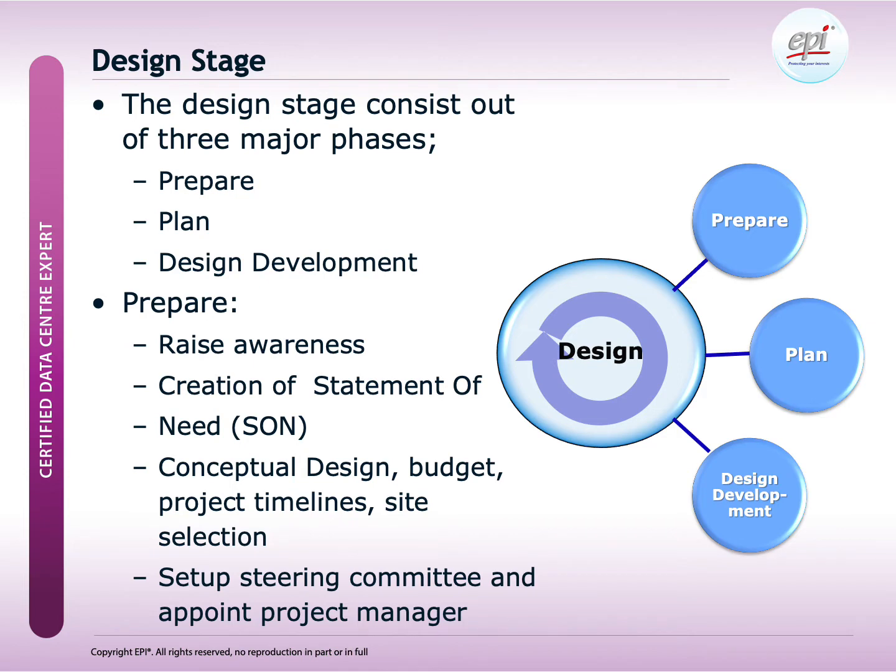In the prepare phase, we need to raise awareness for the need of a new data center. So we need to create a statement of needs, and based on those business needs, we build a conceptual data center design that will give us input to make an estimation of the required budget and project timelines. Also, site selection is part of the prepare phase, as the location of the data center can have a large impact on the required budget.